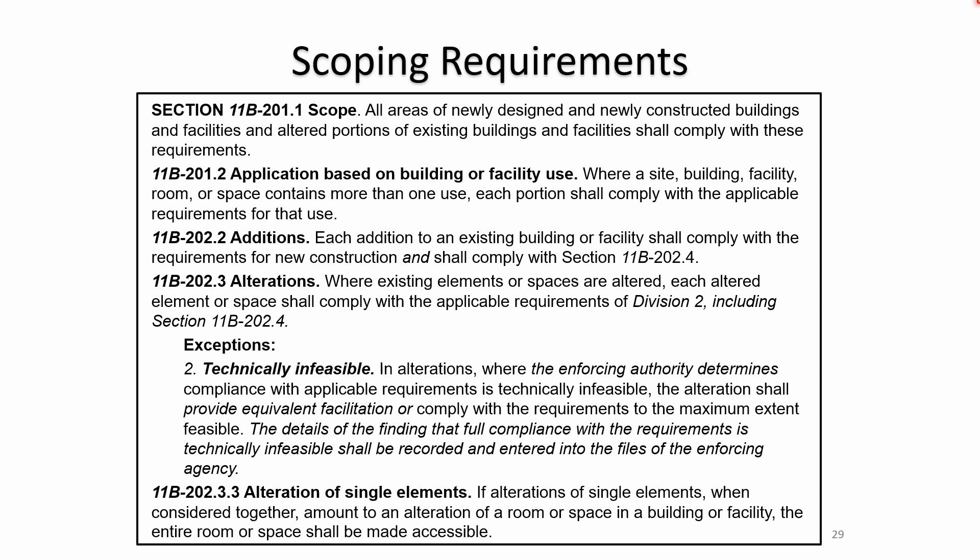Application is based on building or facility use. For additions, each addition to an existing building or facility shall comply with the requirements. For alterations, anything new needs to comply. Where technically infeasible alterations occur, some allowances can be made, but the details of the finding must be recorded and entered into the files so there's a record of anything agreed to as technically infeasible. Alteration of a single element in a room does not trigger additional path of travel.